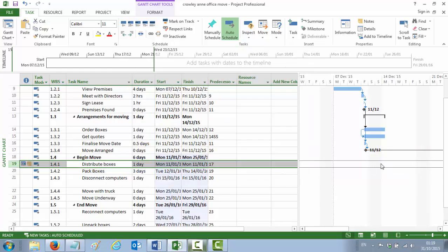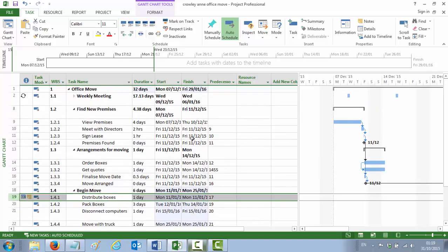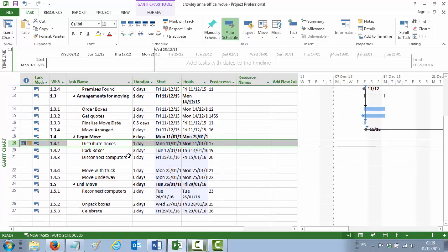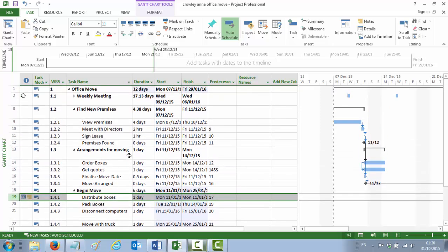Notice that the activity has flown off to the right-hand side of the Gantt chart. It also now has a little calendar icon — if you hover over it, it says this task has a start no earlier than constraint of Monday the 11th of January. Notice also that the duration of your project has got much longer. That's entering a constraint, which is point number 12.